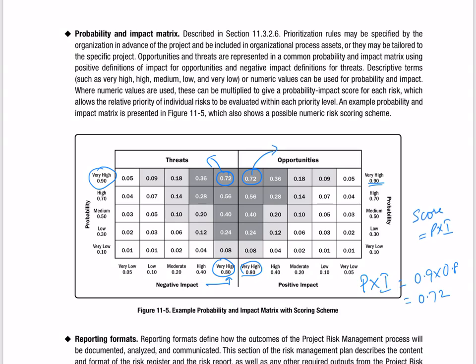So remember this — you need to know how we are calculating risk. The very high, high, medium, low — all these things are subjective numbers. To get a risk score, you can put some values to it, and then the product of that becomes the risk score. However, this is still a qualitative risk analysis because it is very subjective — here you don't get the dollar value. So this is not quantitative risk analysis; this is qualitative risk analysis. That's all in this video about probability and impact of a risk, and the matrix of probability impacts for the risk.